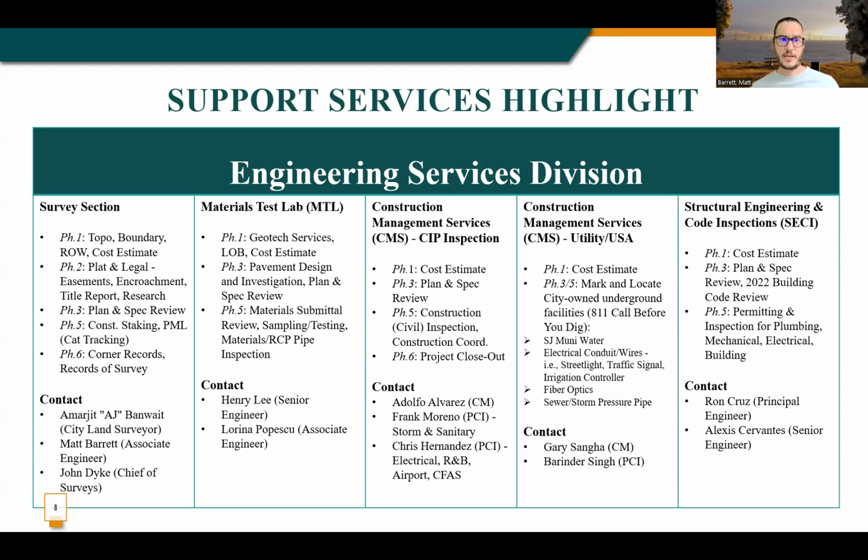Phase 3 is also the time when we can provide any supplemental survey work if we need to help you refine your scope or adjust your scope before you finalize your plans. Phase 5, we provide construction staking services, pavement marking layout, monument preservation services if your construction is going to impact survey monuments. And in phase 6, helping to close the project out, filing any corner records or records of survey related to survey work on that project. If you have any questions about any of those services or want more info about how we can help support your project, you can reach out to our city land surveyor, AJ Banwaite. You can reach out to me, or you can reach out to our new chief of surveys, John Dyke.